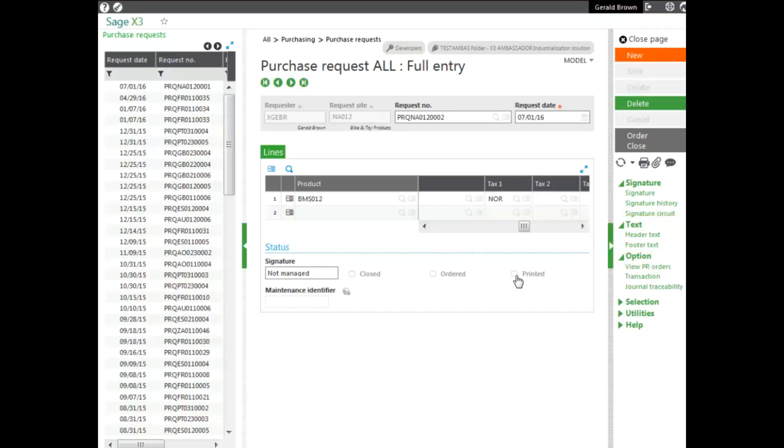If the supplier was selected, I click the order button. It automatically generates an order in the purchase order function. If it's ordered, this checkbox is checked that it has been ordered.